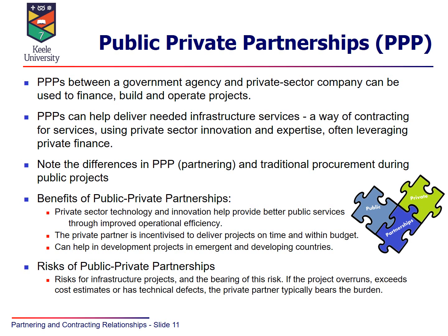Okay, so that exercise was one where essentially we were introducing issues to do with public-private partnerships, PPPs. A PPP is a partnership between a government agency and a private sector company. And the notion is that we're using the private sector to finance, build and operate projects to get them off the ground. So essentially it's outsourcing a lot of the work that would otherwise require it to be done from within the government agency.